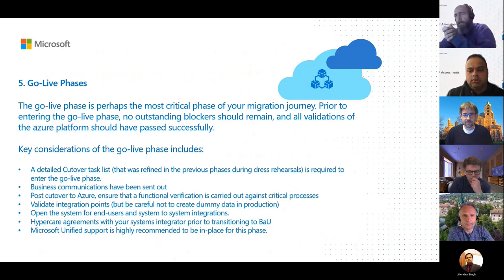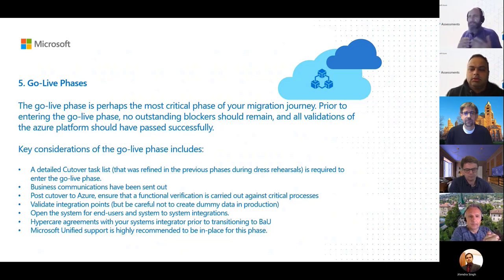But you've got to think about not just going live and turning on your systems in Azure. You always have to think about that dreaded cutover task list in the Basis world that often contains thousands of activities, right through from drain stopping systems and informing the business community that there's going to be an outage, to setting your maintenance page on all of your load balancers. Those are the kinds of things we do. We then pull the trigger and the floodgates open. We promote those systems to productive capability, and that's the customer going live.